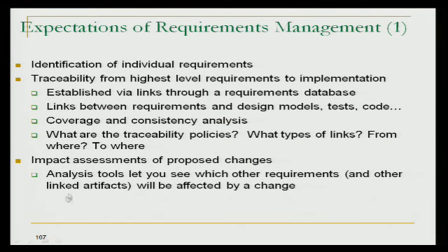Normally in a change control board, before you come in with a requirements change, you have to have completed an impact assessment so that everyone reviewing your change proposal understands the total impact. Because if you come in and say, oh yeah, the impact assessment is about 12 man-months. In other words, I want to make this requirements change, but it's going to cause 12 man-months of effort with all these other guys. Well, 12 man-months in the US on a fully burdened pay scale is about $200,000. Are you now willing to make that change if it's going to cost $200,000? Okay, it puts all that on the table so you can have a discussion on it.